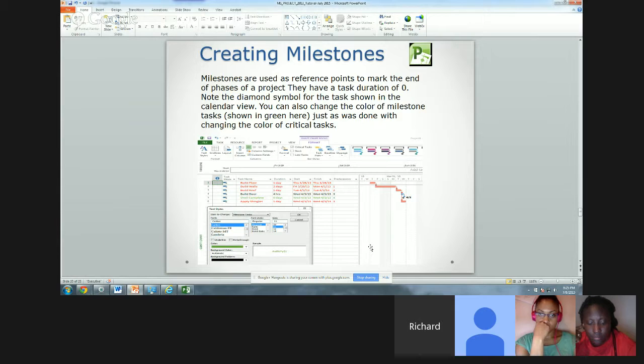So that basically, once the shell of the shed is complete, I want to go ahead and mark it with a milestone. Yay, we finished the shell. And so it needs all those things. And so shell complete is not a task. It's not an activity. It's a milestone. If you put any task in there and give it a duration of 0, automatically it's a milestone because it doesn't take any time.